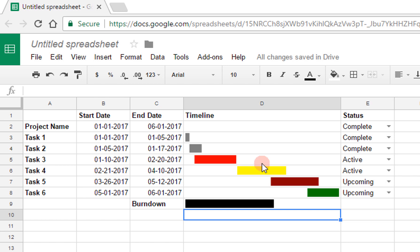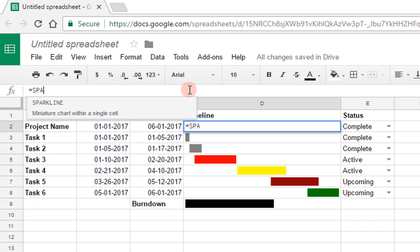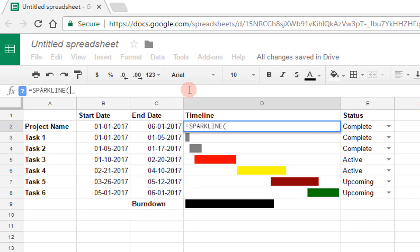And one more enhancement here is for this first line, I wanted to represent kind of the weeks of the project, and so once more, I'm going to use sparkline. I'm going to say this is equal to sparkline of, and here my data is going to be a bunch of segments, each one of length 7 for the duration of the entire project, the 7 corresponding to the number of weeks in the project. So it will split it up into weeks. And so, in order to do this, I'm going to use a couple of functions.